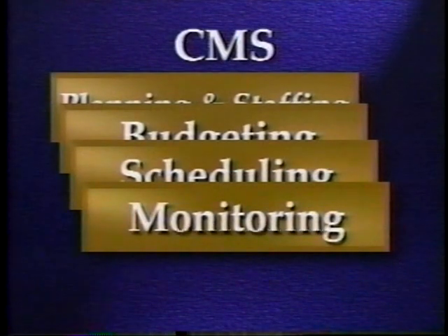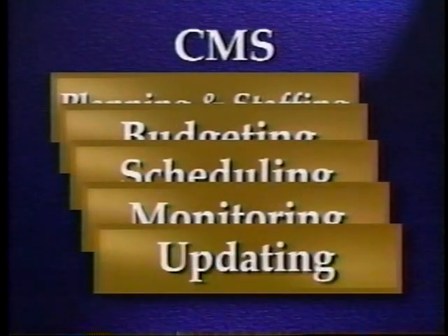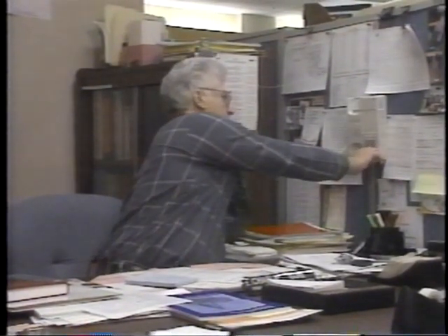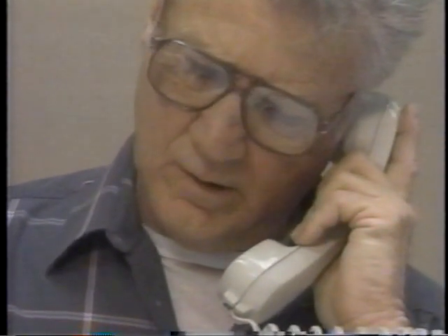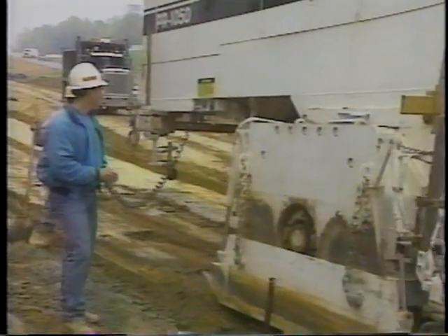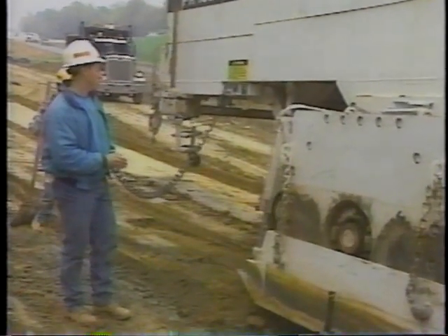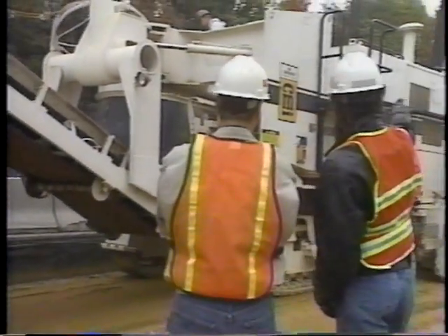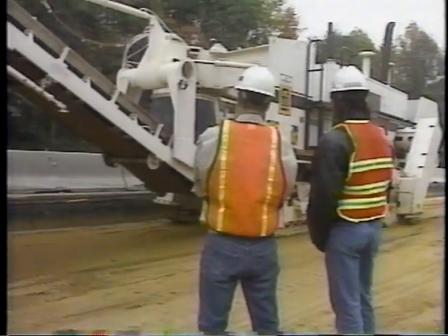The next phase in the construction management system design and development is system monitoring and updating. For every objective, there must be a way to measure accomplishment of the objective. The work monitoring method provides for evaluating work performance, staffing, and construction progress, and for making staffing adjustments when necessary. It also provides data for updating standards.